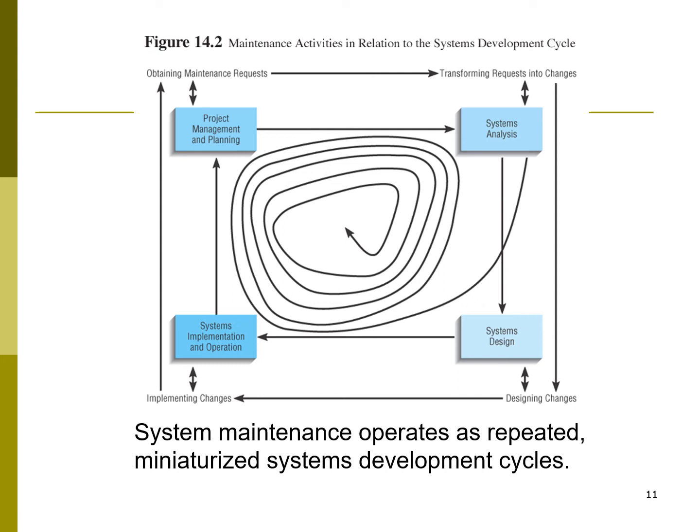Okay, so let's say when there are requests for maintenance, either in the form of corrective, preventive, adaptive, okay, any one of the 4. So once you receive it, the project management needs to decide whether to accept it or not. Okay, so once the request for maintenance is accepted by the development team, they will go to the system analysis phase again.